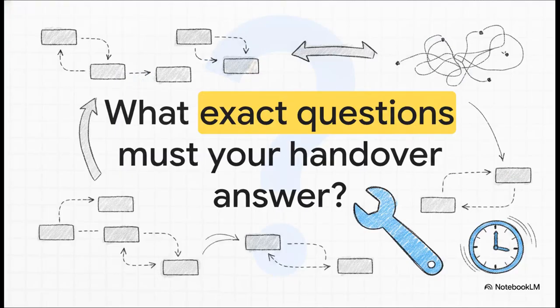Think of this as the ultimate foundation you've got to lay down before any single line of code is written or any actual building begins. Because here's the thing, the biggest threat to your project timeline, it's not coding bugs, it's structural ambiguity. If your developers have to start shifting lessons, moving topics, or rearranging quizzes after they've already started building, man, your timeline and your budget are going to take a massive hit. You absolutely have to plan the flow before they build.